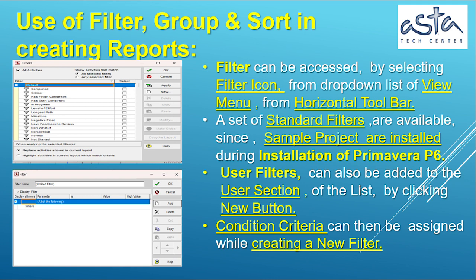Use of filter, group and sort in creating reports. Filter can be accessed by selecting filter icon from drop-down list of view menu from horizontal toolbar. A set of standard filters are available since sample projects are installed during installation of Primavera P6.